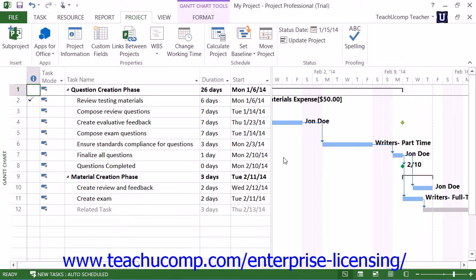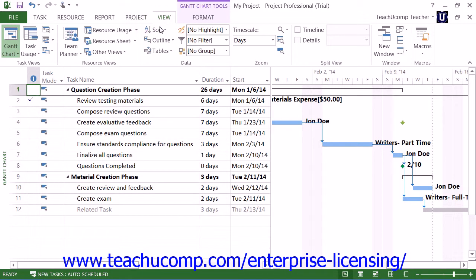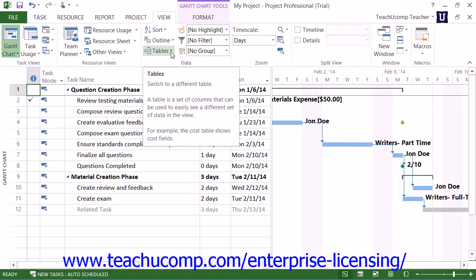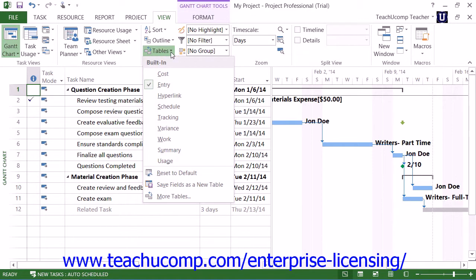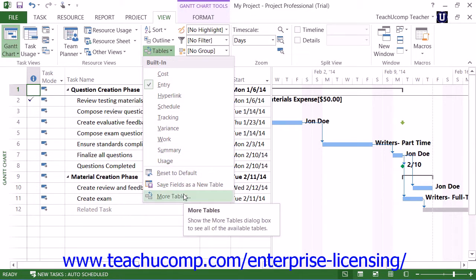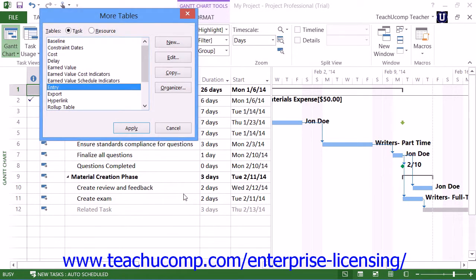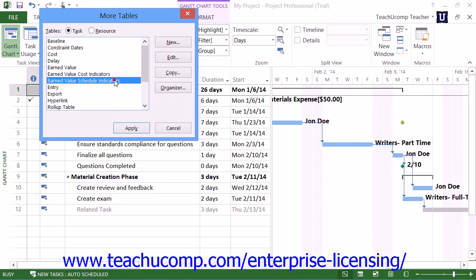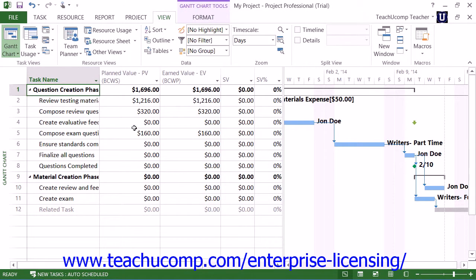Once you've accomplished these tasks, you can easily view the earned value schedule indicators for your project by clicking the Tables button that appears in the Data button group on the View tab in the ribbon, and then choosing the More Tables command from the drop-down menu. In the More Tables dialog box, you can then select the Earned Value Schedule Indicators choice from the list and click the Apply button to display those values in the Gantt chart view.